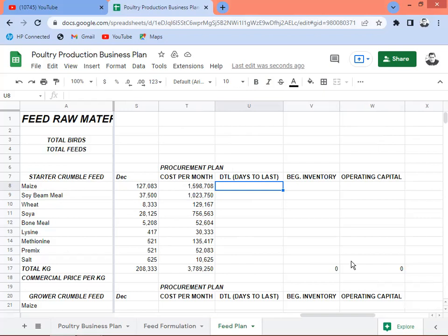It is the stocking requirement that we have in the inbound warehouse, in terms of how many days the stock is gonna last before we procure again, so we can make the necessary arrangements for the procurement process: the raising of the PR, the purchase requisition, processing the approval of the PO, purchase order, and then getting the LC. What is LC? LC is letter of credit.